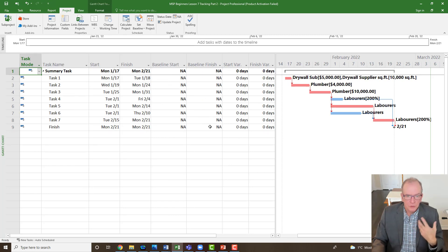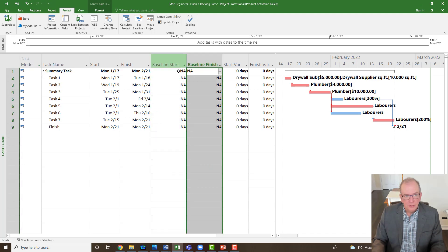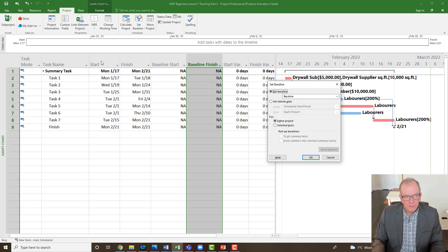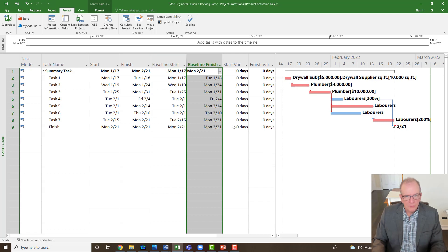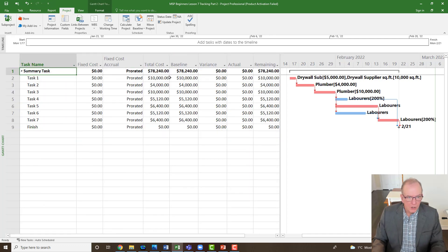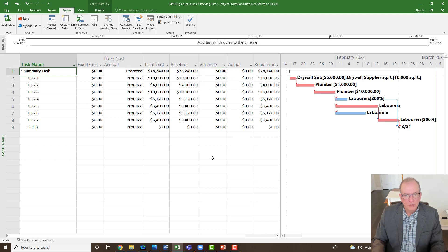You know you haven't set a baseline if the costs are showing zero. You can also click the square icon box and go to the variance table — you can see there's no baseline here either. When I set baseline for the entire project, it's going to copy all the information from the planned columns and paste it into the baseline columns. Now we've got a baseline set, and when we change stuff it'll show us the differences in time and cost.